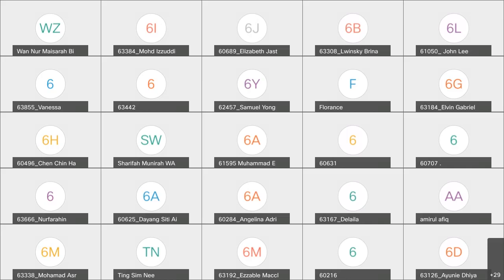And then if the work is done, do you do any checking on any component, or slump tests? Do you do concrete tests? You send it to the lab to do compressive tests and all that, the strength tests. Then from there, if it fails, if it's less than the required strength, you have to go back to check, or do whatever the next action is.